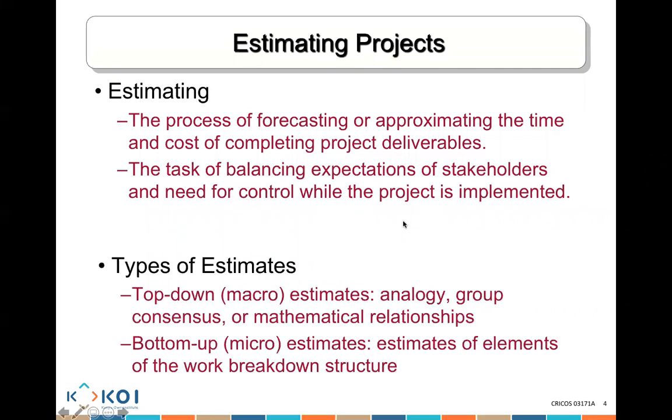when we are talking about delivering that particular project. So when I talk about estimation, I talk about different types of estimation. I talk about top-down estimate, and I talk about bottom-up estimate. Top-down estimate is like you have a high-level estimate, and based on that high-level estimate, you use it to estimate the time and the cost within your particular project. Bottom-up is more about, let me get to the details, so the tasks that need to be done, and let me estimate based on understanding those details